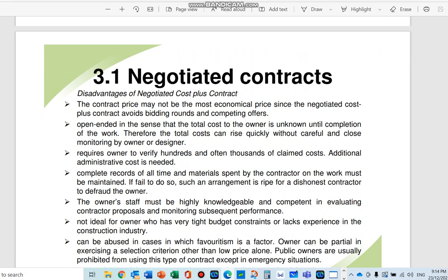So this will usually be some form of negotiated contract. With this sort of method for contracting, you will match a certain tendering method, and normally this will match a negotiated, quotation or proposal-based kind of project better compared to just lump sum, or the traditional procurement strategy whereby the design is pretty much complete. So you can do this for complete designs as well, but